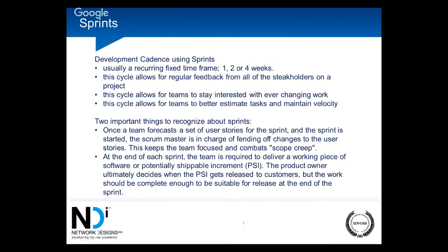each one of those 1 to 5 elements is a particular amount of work that your developers know they can accomplish in a certain amount of time. So let's say that each one in a 1 to 5 is an hour. We know we're never going to have a ticket that's bigger than 5 hours. Now that's ridiculous, but for this process, we're going to say that. So if I have one ticket that's 5 hours, and the next ticket is 3 hours, I know I can do both of those tickets in one day because that's 8 hours.